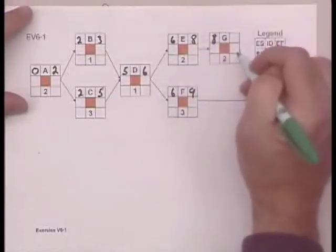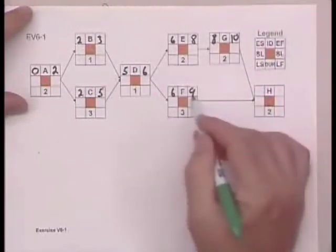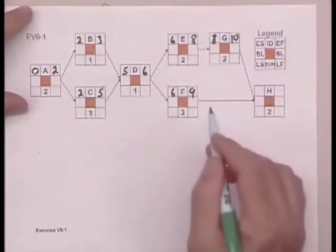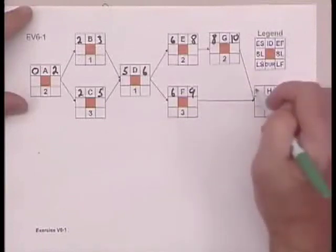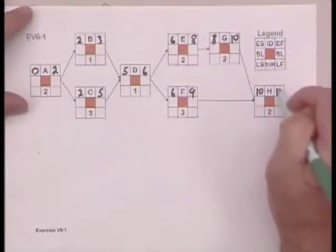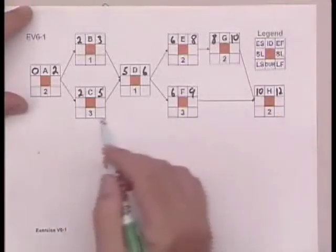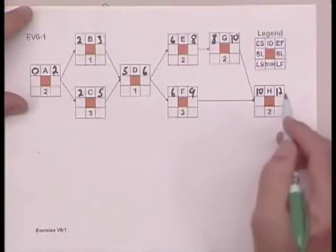G can start once E is done, which is ten. Now we have another choice, ten or nine. Remember that we choose the higher number, and that's ten, and then ten plus two is twelve. So the earliest that this whole project can be completed, if we're talking in terms of days, is twelve days.